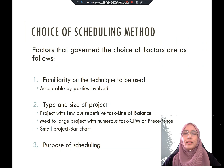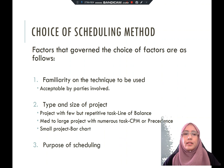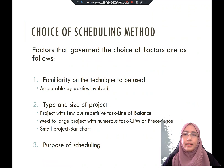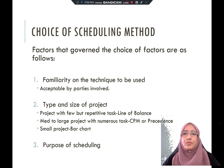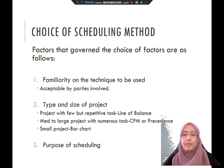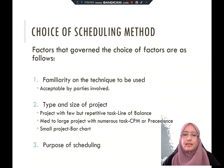In order to choose the suitable scheduling type for a project, it depends on a few factors. The first is familiarity with the techniques — all project team members need to be familiar with the technique used, and it must be acceptable by all parties. The second is the type and size of the project: for a large repetitive project, use line of balance; for a medium to large project with numerous tasks, use CPM or precedence; for a small project, use a bar chart. The third factor is the purpose of the scheduling.